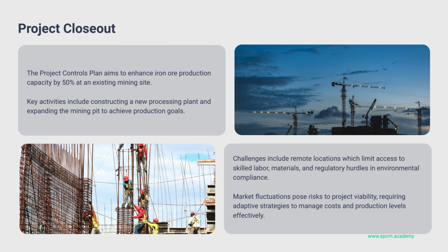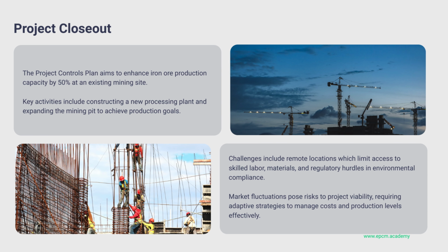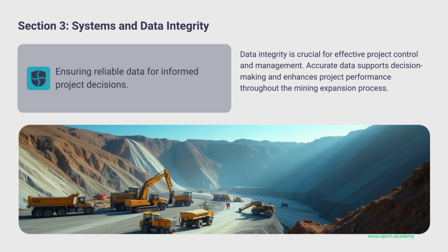But EVM gives you a deeper insight by calculating earned value. Basically, the value of the work that's actually been completed. You can see that you're actually behind schedule and over budget. So even though you haven't spent all the money yet, you're not getting the value for the money you have spent. Exactly, and that's the power of EVM. It gives you those early warning signs so you can take corrective action before small problems snowball into major issues. So EVM helps you see the forest and the trees, the big picture and the details. That's a great way to put it.